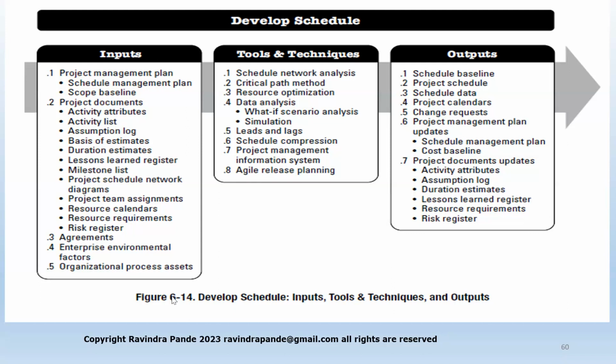Then we have agreements, for example penalty clauses. What are penalty clauses? If you don't deliver the car before Christmas, I might deduct $5,000 from the payment. And this is the agreement. We might agree with the client to start with because we know we are going to deliver before Christmas. But then Corona came, then the snowstorm came, then the engine delivery got delayed from my Chinese partner or something like that.